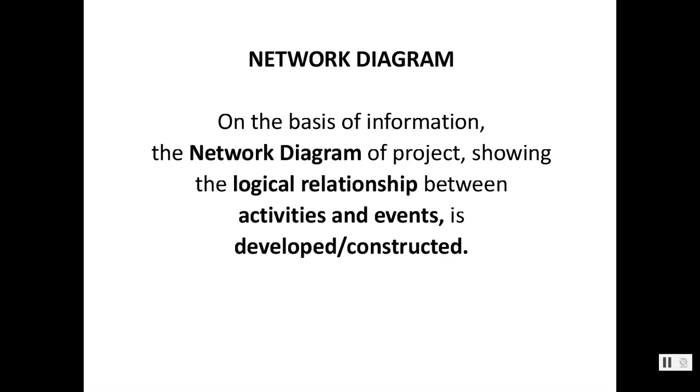On the basis of input and information, we have the network diagram of any project, showing the logical relationship between activities and events, developed or constructed. A network diagram is nothing but a logical and sequential relationship between all the activities and events of the project at the time of planning.